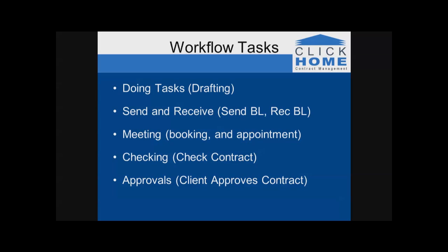The next type of task is checking task. So you might have a drafting working drawings task, but then that might be reviewed by the drafting manager. So you'd have a separate task just afterwards going working drawing review, and that would be assigned to the drafting manager role. And then other tasks are approval. So client review of contract, client acceptance of preliminary design agreement, those kind of things. So a combination of those, and those are the types of tasks that you'd want to put onto your pre-construction workflow.